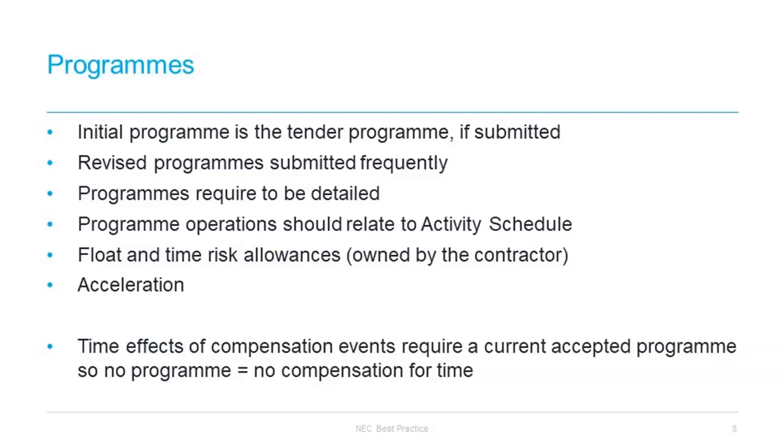And it's vital in our experience that administrative activities like keeping the program up to date are done contemporaneously, as there's really no catch-up provision within NEC, and the employer has the upper hand if the contractor falls behind with this administration, because they will lose entitlement to compensation events.